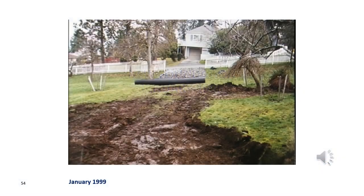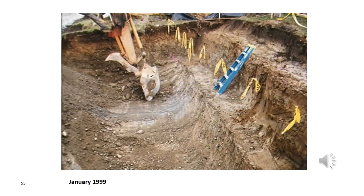The original home site is now clear, and we're ready for the foundation work. A temporary access road was constructed from Balch to the original Orr home site to provide access for the equipment that needed to get in for the foundation construction. Excavation for the basement is well underway. Can you imagine doing this by hand as was originally proposed?